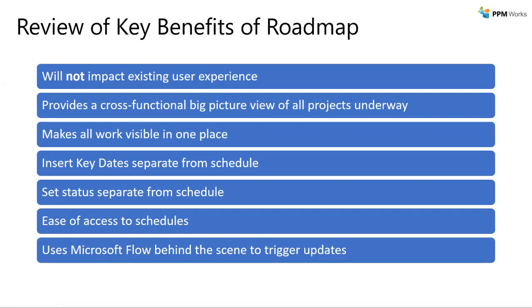So yes, the roadmap is actually going to pull the 5 things, but really we only care about 4 of them. It's going to pull out the finish date, the start date, the name, okay, as well as the information about who. So it's going to bring all that information in and present that. Okay, it also has an ID that's in the background for reporting, which is pretty nice.